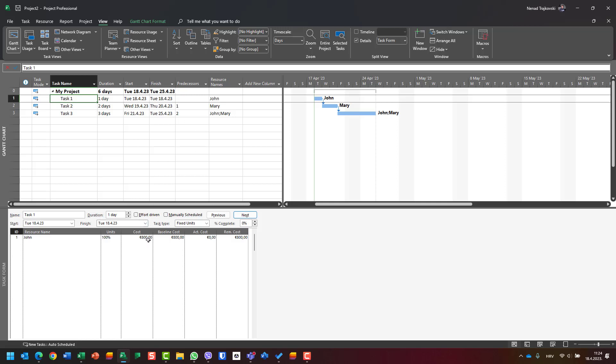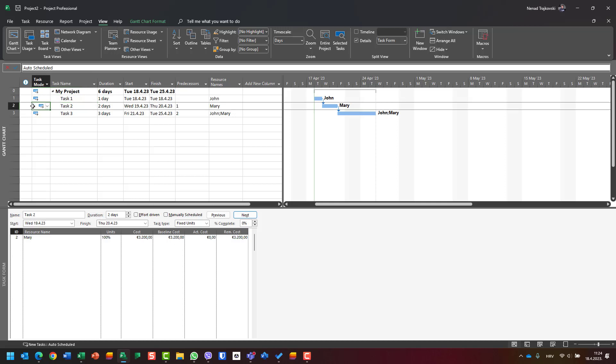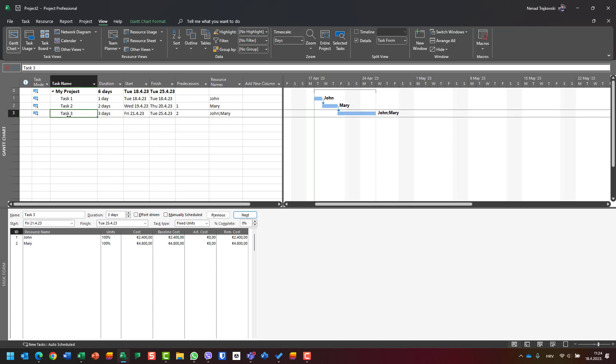For Task 2, I see for Mary 3200. For Task 3, I see specific costs for John and Mary. But you might say, 'This is great, but how can I see at the same time the total cost for the whole task?'